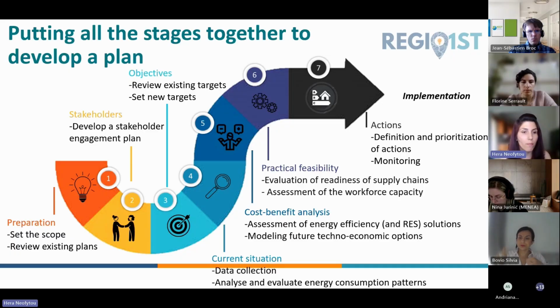So the first phase, the preparation, includes two key steps: setting the scope and reviewing the existing plans by identifying previous challenges, successes, gaps, and lessons learned.